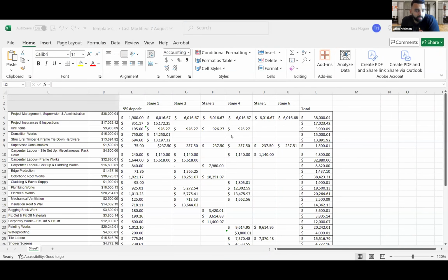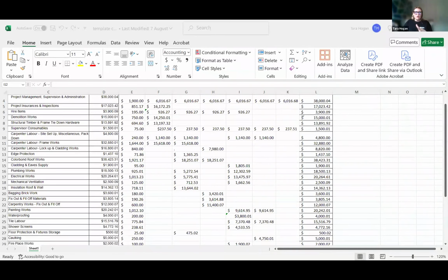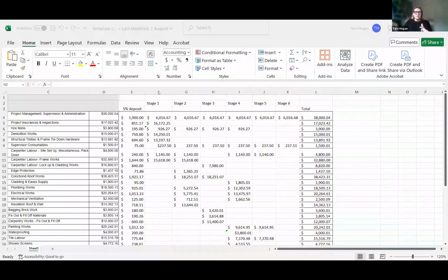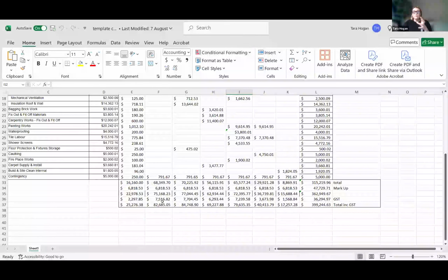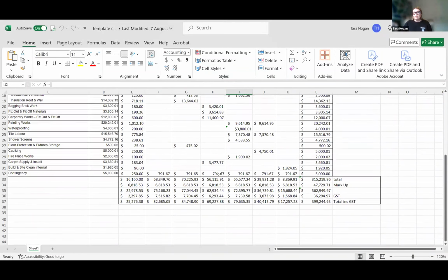All right. Sorry, everyone. Yeah, we're there. So you can see here that this is an example of setting out a stage claim, and you're taking all the items that we're building in Buildxact, and then we're assessing what that costs, how it looks, and then we're setting that stage claim that we can then look back into our schedule visually and go, this is what this is going to bring me. And then when we're in Buildxact setting out the stage claims, that's how we'll have all of that information linked back to Xero to then calculate the numbers of monies that's going out, monies that's owed, the money side of things against how we're running the job.